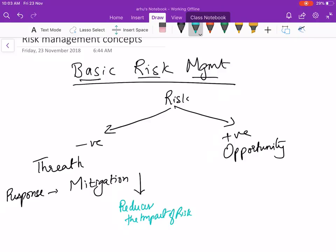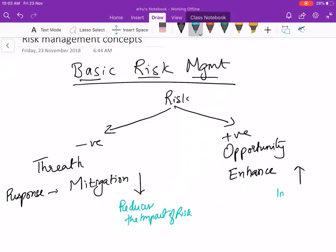The corresponding response for opportunity is called enhance. Enhance means it increases the probability of achieving that opportunity. It could be like you are sure that you are going to get a project on Amazon web services, so you get your team initially trained on this. The money you invest on training enhances the opportunity of meeting the project objective.